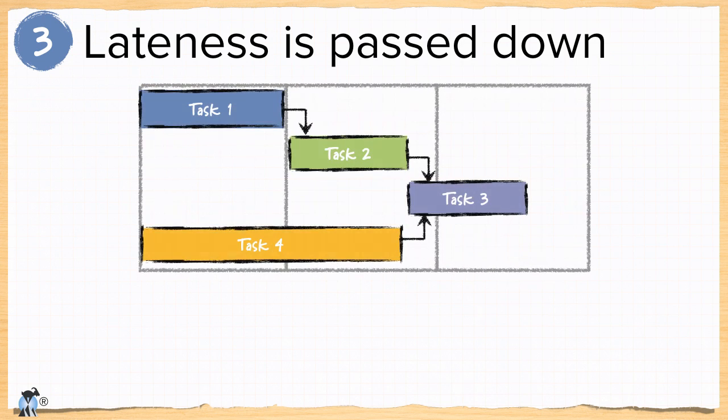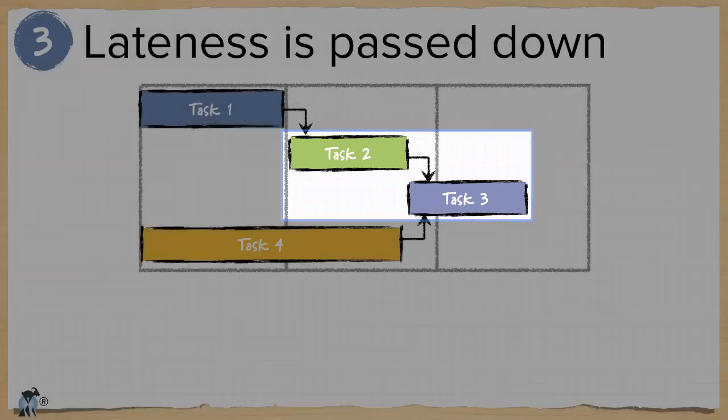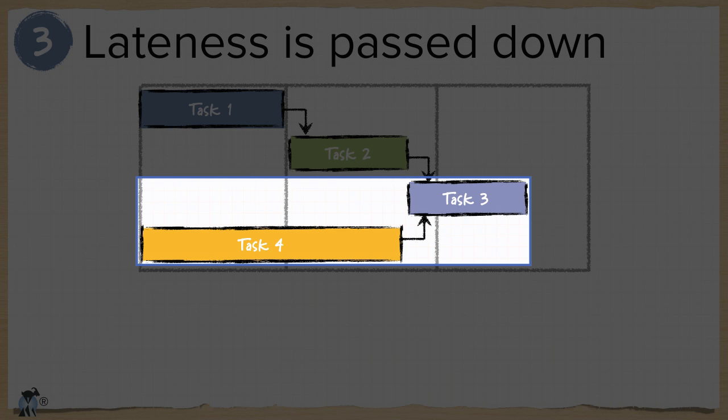Consider this very simple Gantt chart. We have four tasks. Task 3 is dependent on task 2, which is itself dependent on task 1. Task 3 is also dependent on task 4.